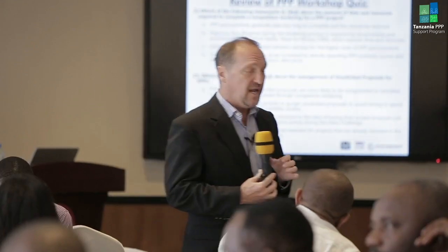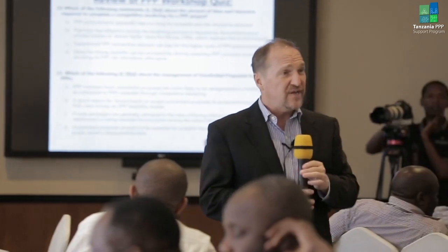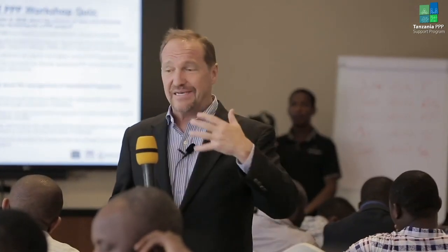The answer is A. One of the things that we find is that when unsolicited proposals are provided, in many cases, not all, the level of due diligence and rigorous analysis and preparation is less. In some cases, I've seen they say, we'll sign the contract now, we'll proceed with the project, we'll figure out the detailed risk allocation later on. Let's get this going.